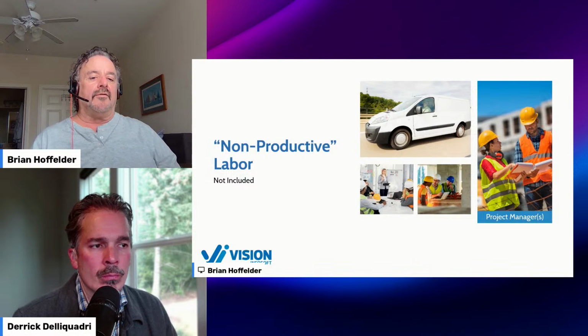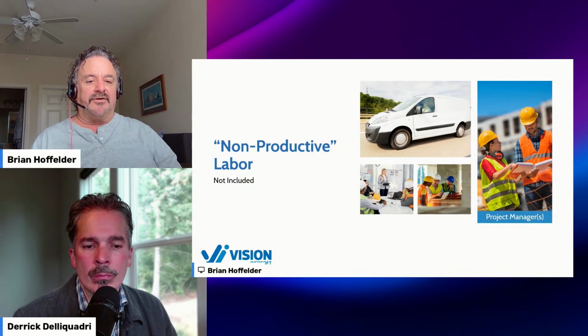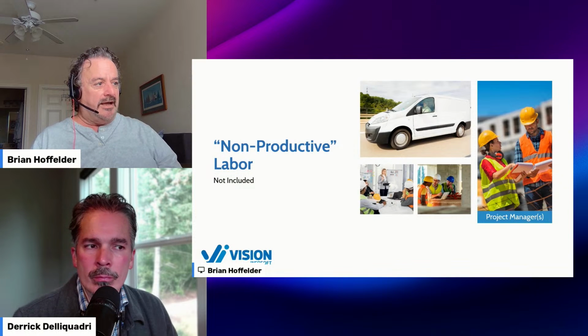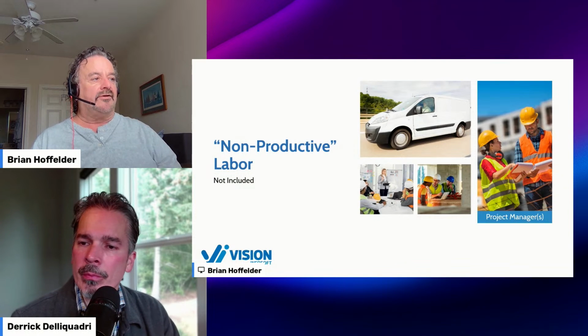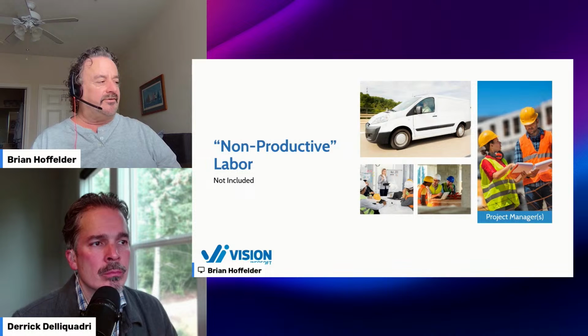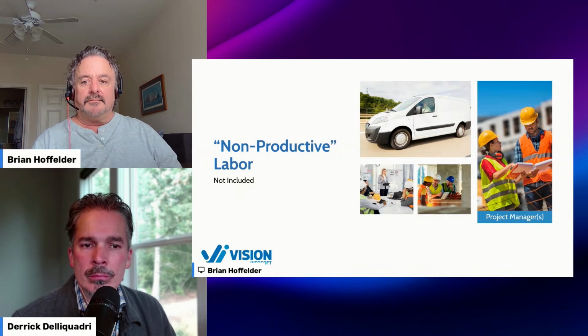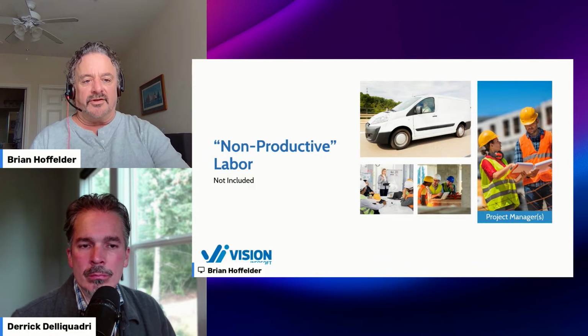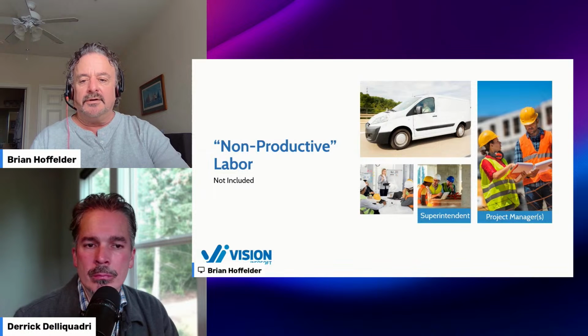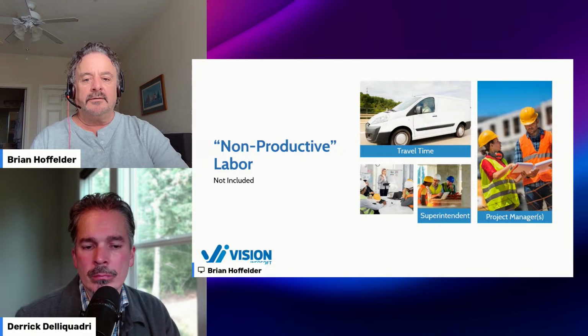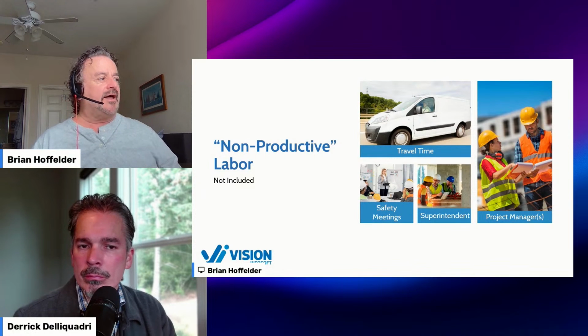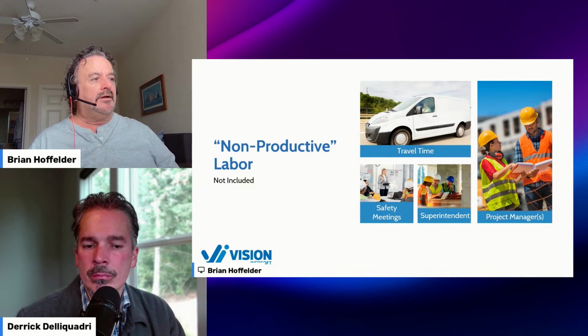Although this could fall into two different categories. If your project manager's time is tracked to the job, costed to the job, then that's not included. Another thing that's not included is travel time, supervision, safety meetings. Those kinds of things are not included in the general non-productive labor.